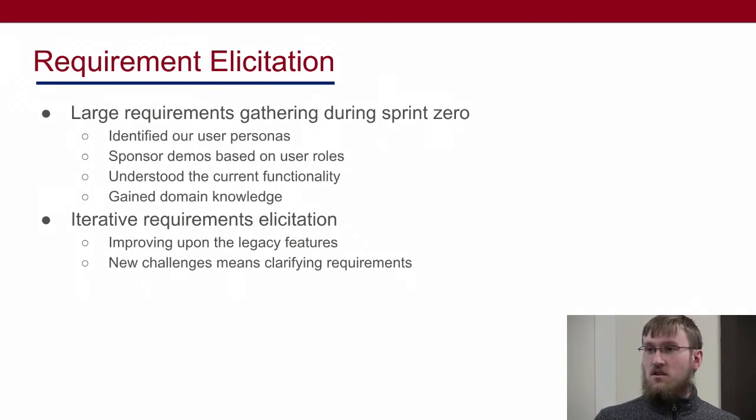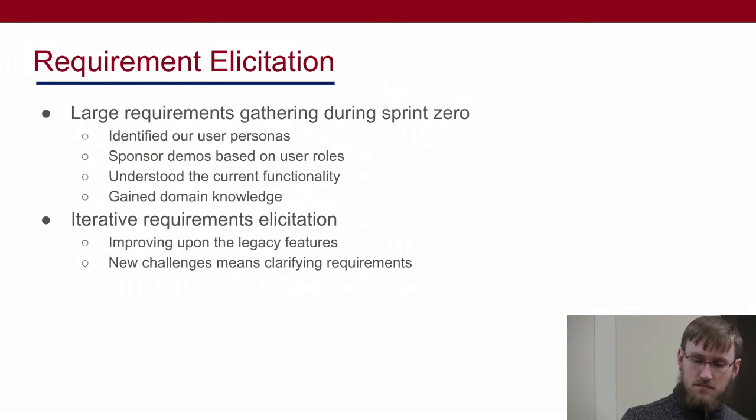Now, because this was still early in the project lifecycle, we had a relatively poor understanding of the requirements as a whole, and so this fed into a cycle where we would generate and improve our design based on our knowledge of the requirements, and then we would use the feedback that we got from demoing that design to our sponsor to improve our knowledge of the requirements.